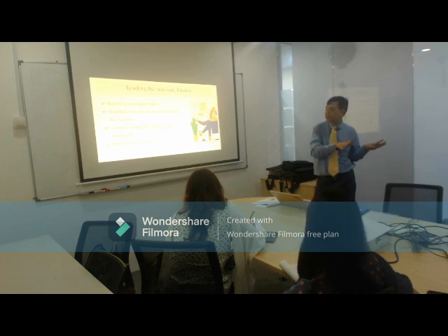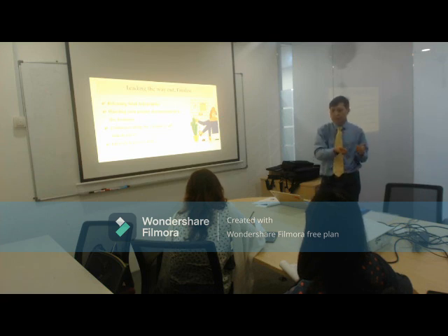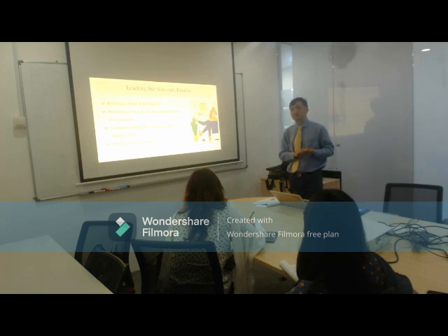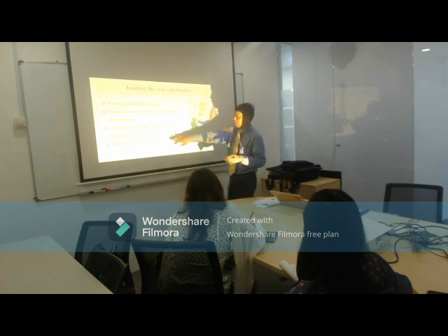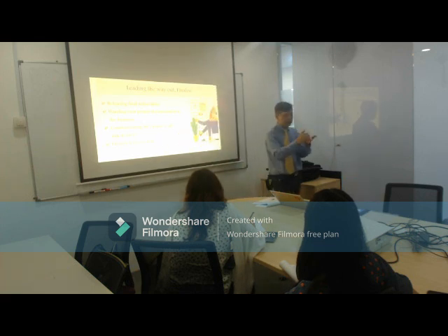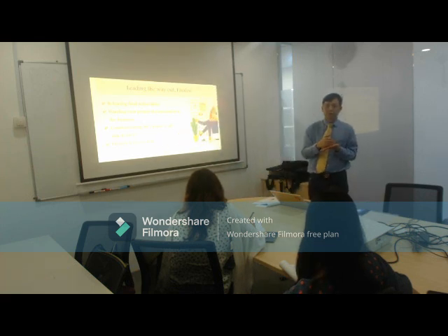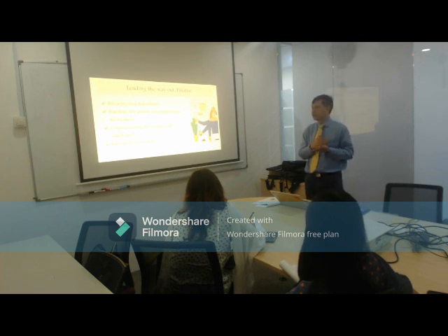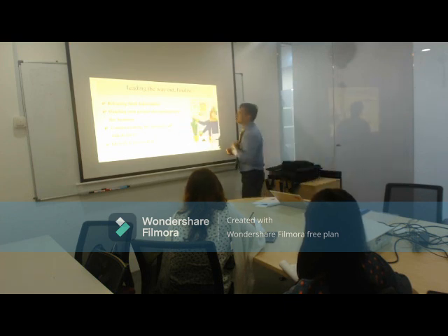And why do we have to depend on them? Because we have to pay them the deposit, and if they don't finish the work, we lose the deposit. We cannot take other people. Okay, so this type of problems coming into place. So lessons learned are normally things that project manager will list out that companies must do or be careful of next time when they do this type of project. Okay, let's go to the next example.